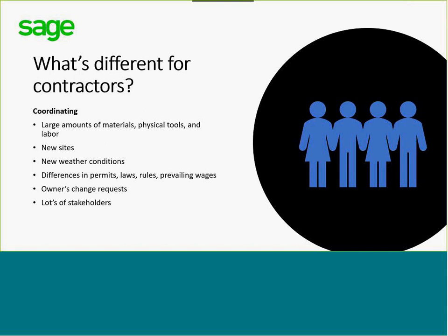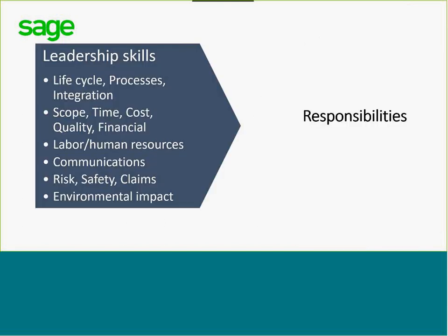So here in Oregon, there are some new labor laws coming into effect around the use of apprentices. A certain number of apprentices have to be on each job being trained, and that's for public projects in particular. And those rules are coming into play. So it can get complicated, which requires somebody who can really handle this wide variety of things and not be surprised and get frustrated all the time.